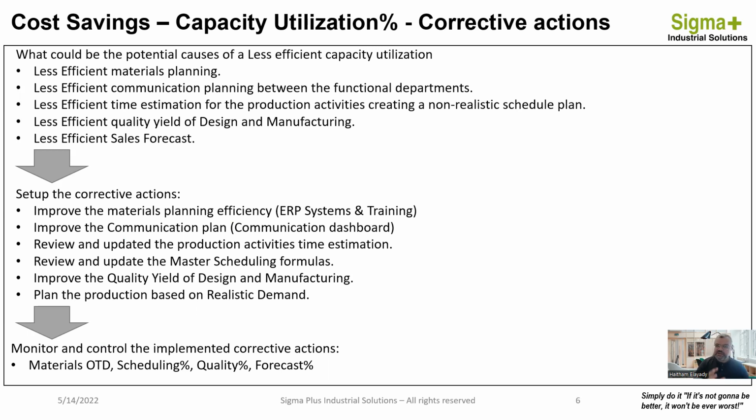But the problem is that when the cost controller takes your time estimation, and you've been putting in long padding time, and padding time means safety time, the company will book a financial budget for that padding time that will not be effectively utilized in the production.